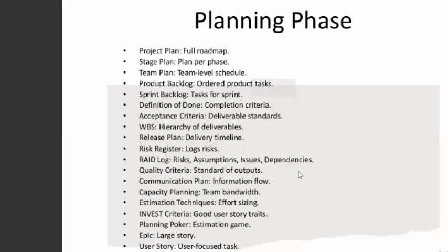So we can say the product owner says the client is saying we should build an account feature. Then the team comes together and asks, what should constitute an account feature? Sign in, sign out. Highlighting that in the sprint backlog, the development team will be assisting in what we call estimation. To create a sign-in authentication process would take us 3 hours. Then you estimate effort. That's what we call effort estimation.